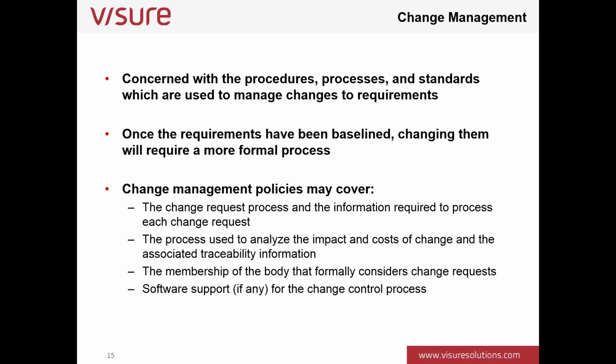Usually we will be creating a new artifact which is going to be a change request that is going to represent the change. We are going to trace that change request probably with the requirements that may be impacted by the change. We even can create new requirements out of that change. Then we can analyze the viability of the change, the impact that the change is going to have in the whole system.